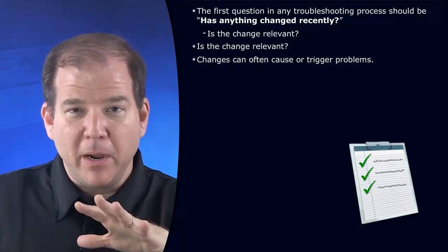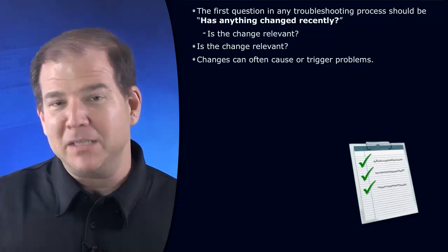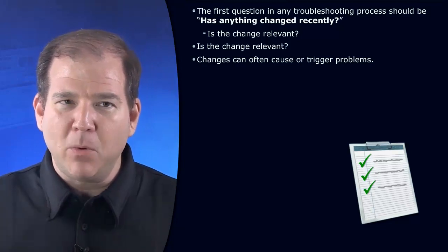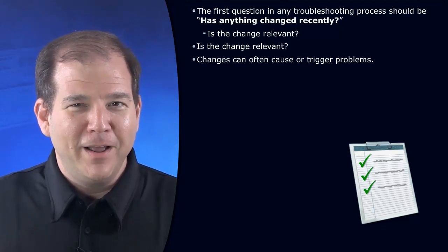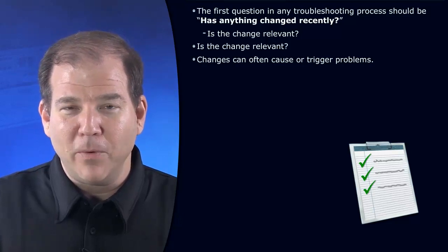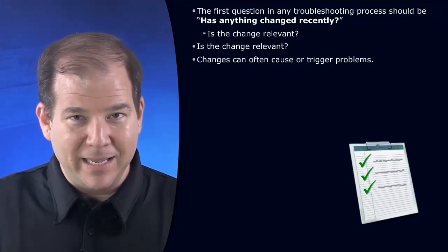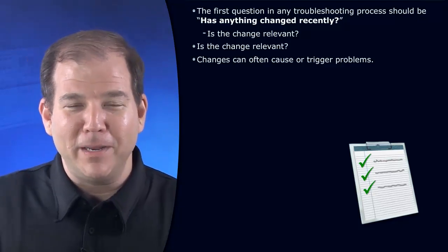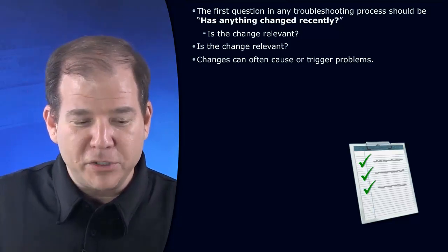I mean, none of the email works. Disney.com as a whole, email did not work. Everybody from Michael Eisner to Mickey Mouse had no email, and we're wondering, did what we just do, just replacing the backbone of the network, did that possibly impact email? Is that a coincidence? Well, long story short, out in Anaheim, California, they had some people out there in the networking department, they had swapped out an ATM module that they didn't bother to tell anybody about, and that had taken down the email. They didn't send out a change notification, and as a result, there was a lot of panic-stricken people in the middle of the night at Disney World in Florida. I'm a big advocate of having a formalized change management system.